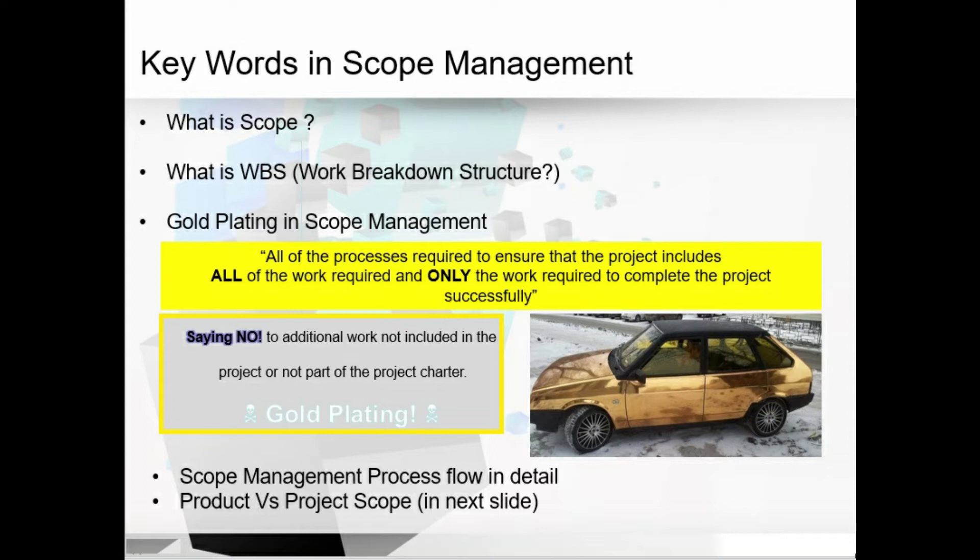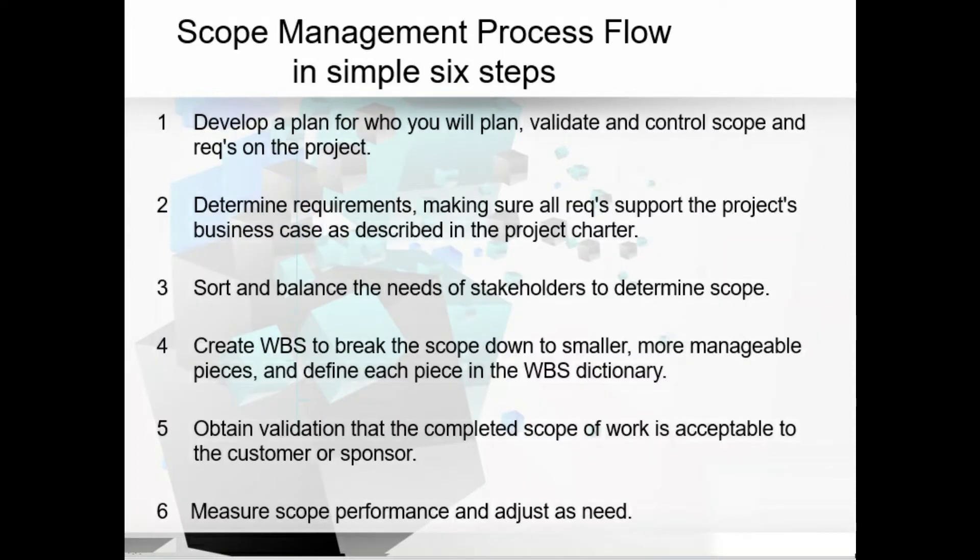Let me explain the six steps of the scope management process flow. Step one: develop a plan for how you will plan, validate, and control scope and requirements. Step two: determine requirements and make sure all requirements support the business case as described in the project charter. Step three: sort and balance the needs of stakeholders to determine the scope. Step four: create the work breakdown structure to break scope into smaller, manageable pieces and define each piece in the WBS dictionary. Step five: obtain validation that the completed scope of work is acceptable to the customer or sponsor. Step six: measure scope performance and adjust as needed.